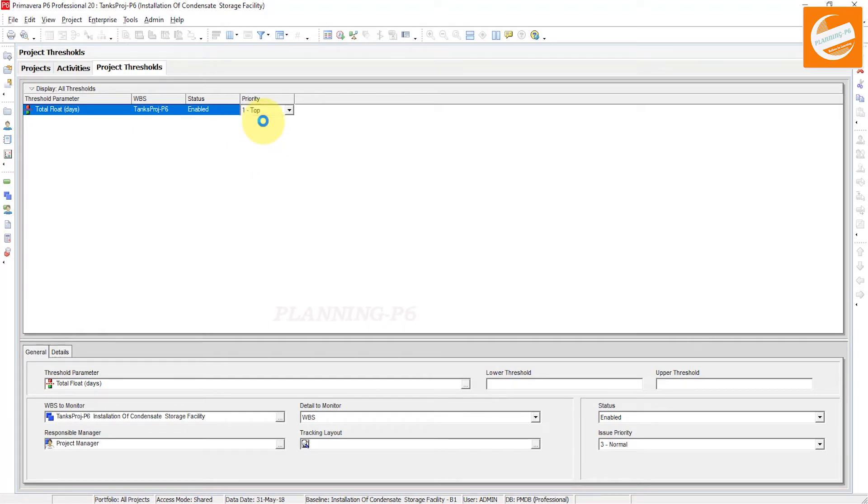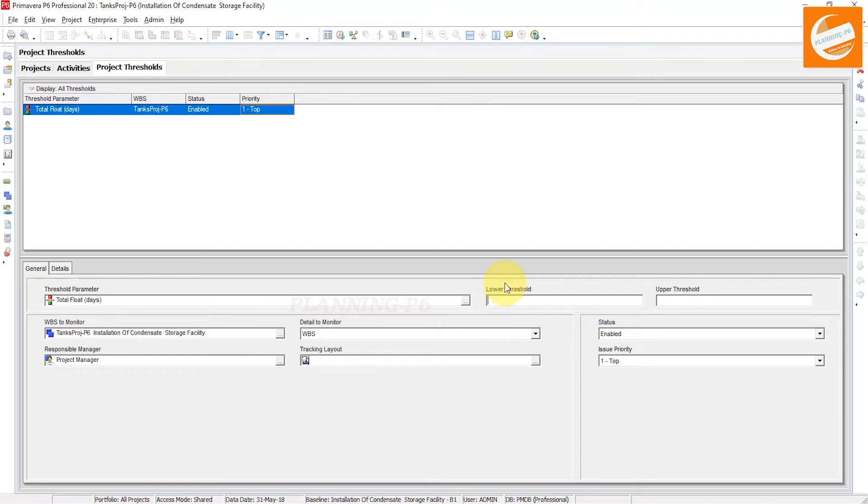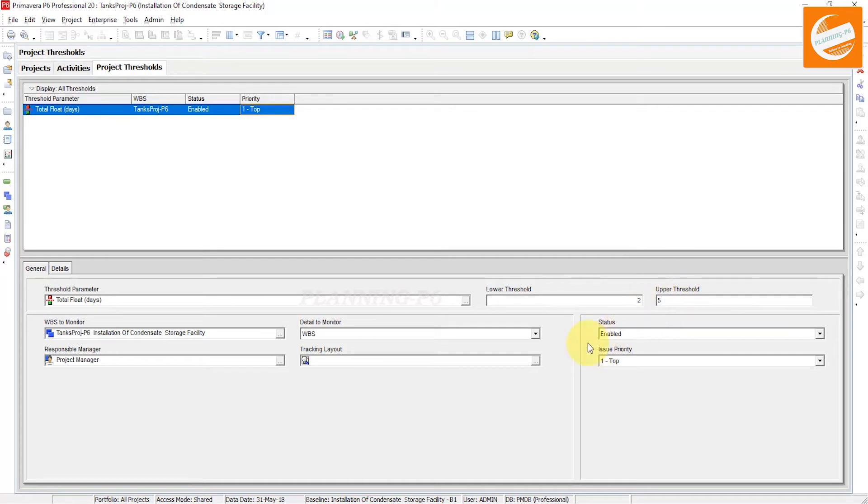Now in the bottom layout you can see here total float days. Now we have to set a parameter here. Lower threshold - here in the lower threshold I want to say two days, and then in the upper threshold I say five days.